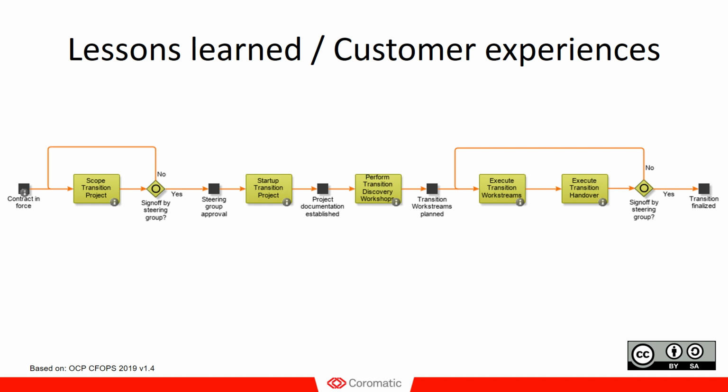So basically you run discovery workshops, and they have different formats. It could be desktop reviews of existing job descriptions and process descriptions and standard operating procedures, and it could be hands-on technical assessments of the sites in scope. What's the condition of the assets, and what's the condition of method statements and configuration procedures and so forth? Based on these discovery workshops, you set up different work streams.